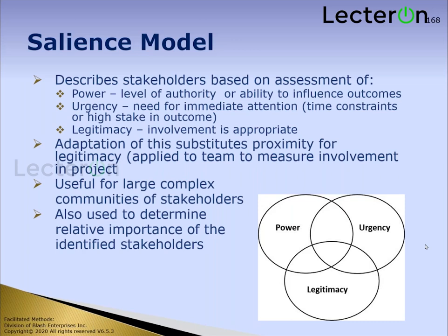That's where I look at this, especially when I get into a whole bunch of stakeholders. What their power is, what kind of urgency I need to have as far as engaging and communicating, letting them know what's going on, and then what is their legitimacy? In other words, what do they bring to the table? Do they bring knowledge? Do they bring vision? Do they bring decision making as we go through? Very powerful way of modeling these stakeholders.